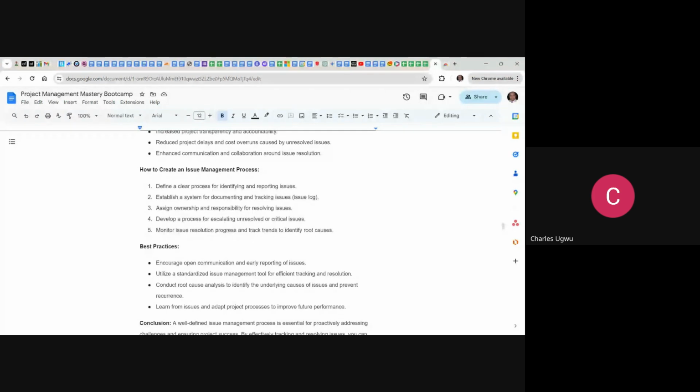Eventually, if it happened, then the next thing is, before it happened, I know it's going to happen, you send a mitigation, an exceptional circumstance form, a documentation, exceptional circumstance, requesting more money or explaining what is going on. You have to be transparent to your stakeholders. You can't just keep quiet. Before you hit that red button, you should have sent signals to the stakeholder that you are running out of funds. So that is a way of escalating this issue.